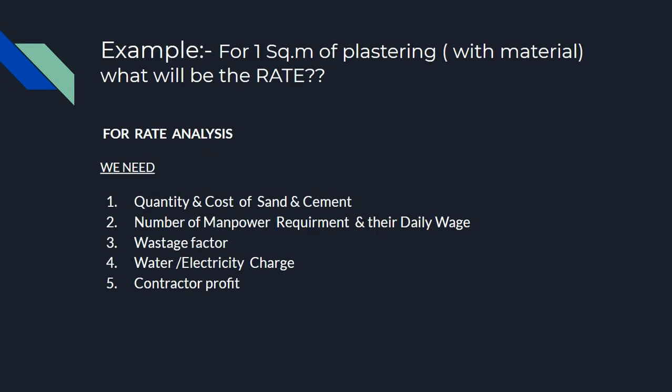I will give you one example. For one square meter of plastering with material, what will be the rate? I will discuss the main points. We need one square meter plastering rate analysis. For rate analysis, what do we need? First, the quantity and cost of sand and cement. Second, the number of manpower required and their daily budget. Third, wastage factor. Fourth, water and electricity charges.